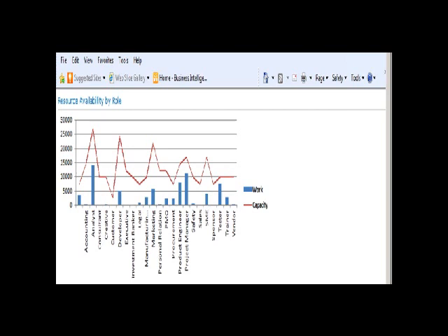uses this assumption that the project managers themselves are accurately reflecting the demands across all the projects that are involved here. You know, I've seen situations where the capacity stays at the resource level and the demand is really the summary of project information. So if the project information is not up to date, this could be a scary, unrealistic view. This could be a view where there's 3 out of 5 projects that aren't even reflected here, and therefore it appears that there's enough capacity to complete the projects when in fact there's 3 projects that haven't weighed in yet that are going to place additional demand on these resources, and we're not getting that picture at the moment.